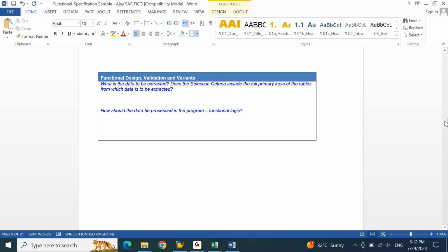Then somebody from your project or from the client side will have to approve. Okay, we are fine with this, please proceed. Then your bill, instead of for 30 days, will go for 35 days. You are ending up paying more for this development. So that is why changes just like that, left and right, as a consultant, I know it's a simple change only, you tell me, I will do it. You are not supposed to do it. Any corrections, once the requirement is freezed, you have got any requirement, if you know that for this you need to make the changes in the existing setup, first thing that you need to do is you need to discuss with your senior consultant or your project lead or project manager.